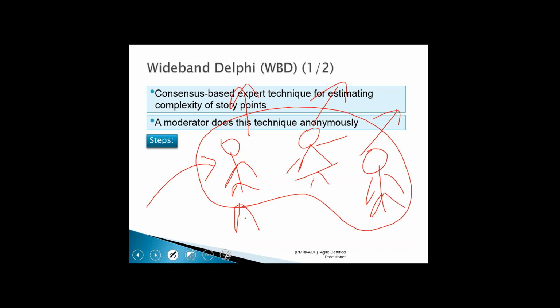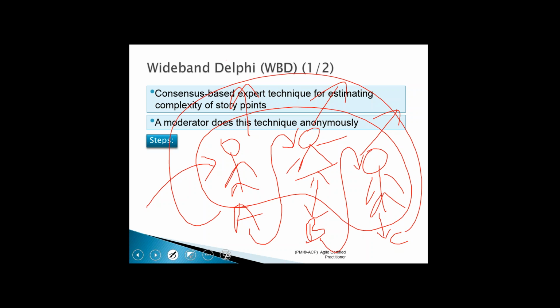Person A is going to give you his findings, person B her findings, and person C his findings. Person A's detail you take and give it to person B, person B's to person A, and person C information to person A for review and further refinement, without anyone coming to know who has worked on a specific feature.